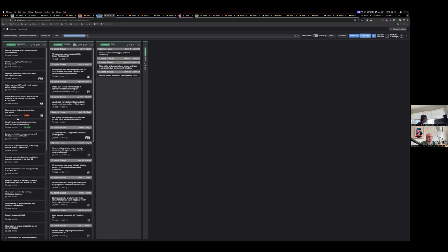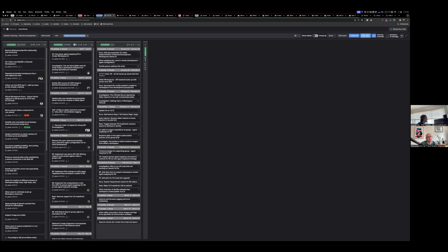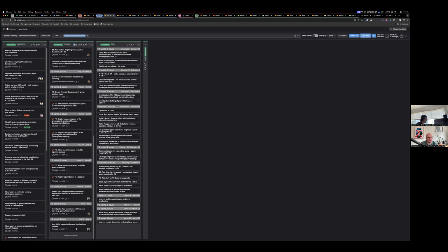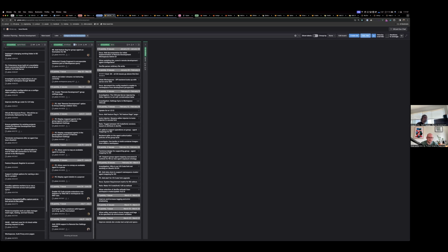So the way you think of it is like time flows. The oldest stuff is at the very top right, if we went back 10 iterations. Then older, newer to the current week, and then down into the future for everything that we've currently refined and prioritized, and then further into the future for things we know we want to prioritize but haven't yet refined. And down at the bottom is everything that's in the backlog, or not going to do, or waiting further demand.